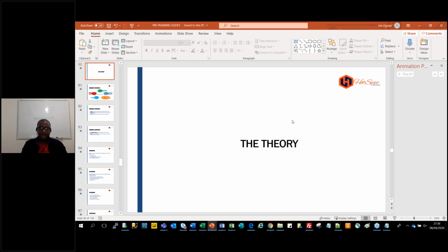So when you set up a plan like that, they've all agreed on it. I set up my resources, everything aligned. Next thing I should do is set a baseline, resolve all the conflicts, set a baseline, and start monitoring and tracking. If anything then moves, these are the things I intended to do at the time. I will move some tasks out of line so that it creates a critical path for us. The red part I drew up here, you will see it.